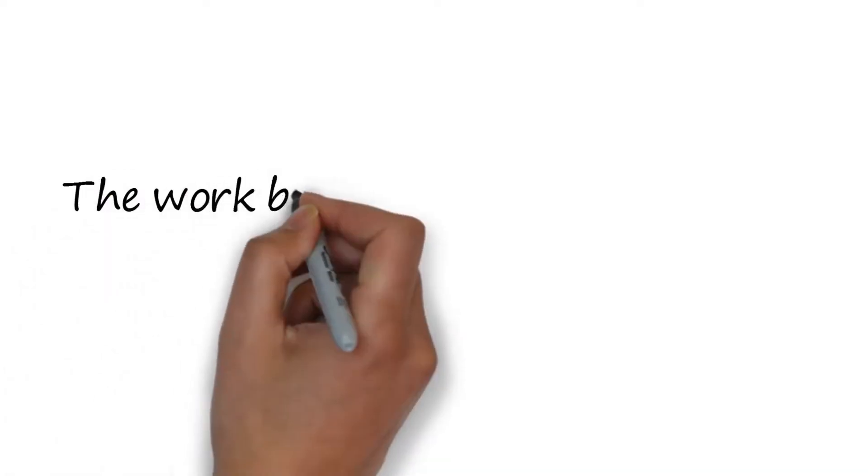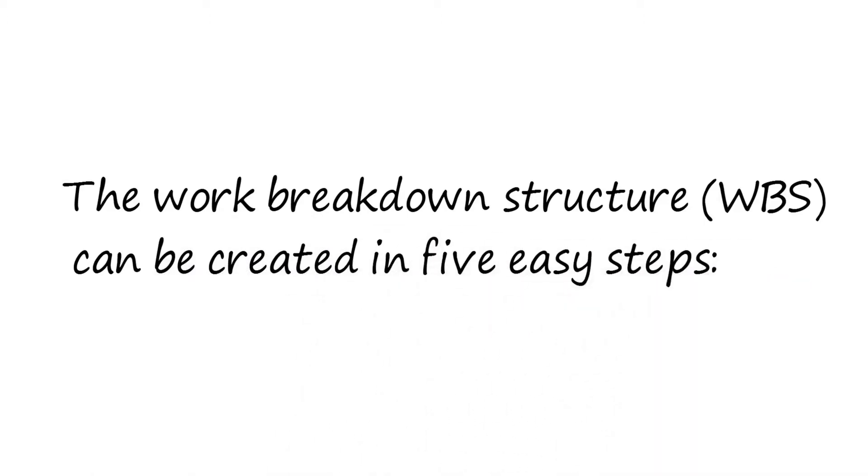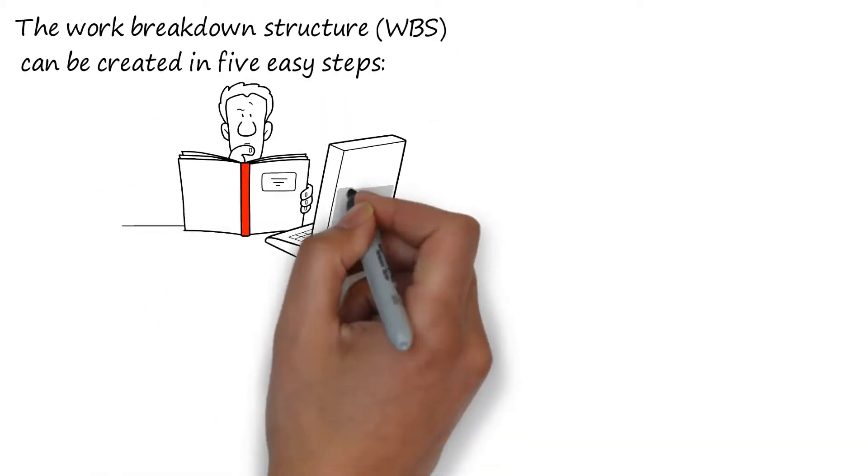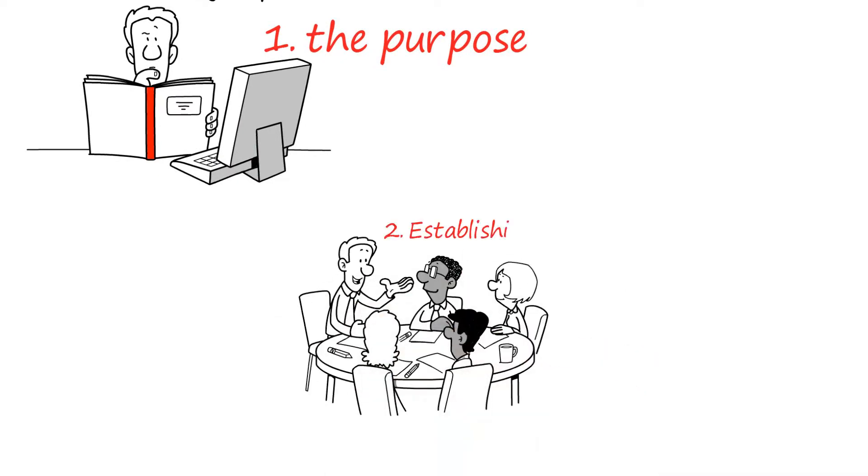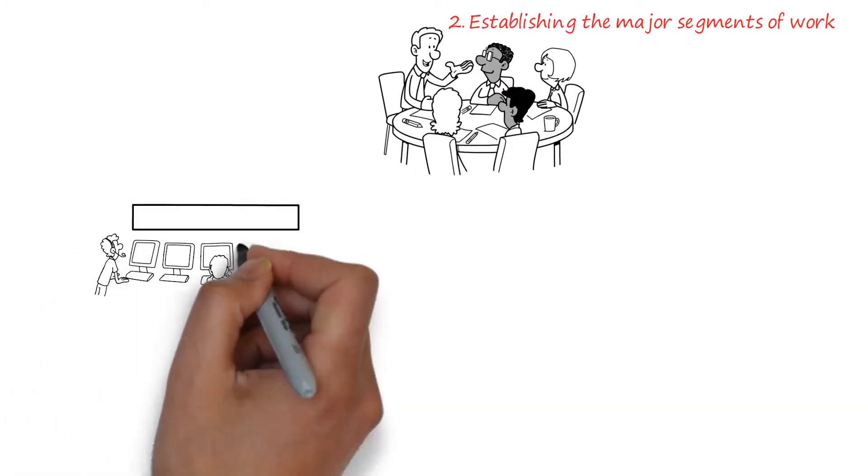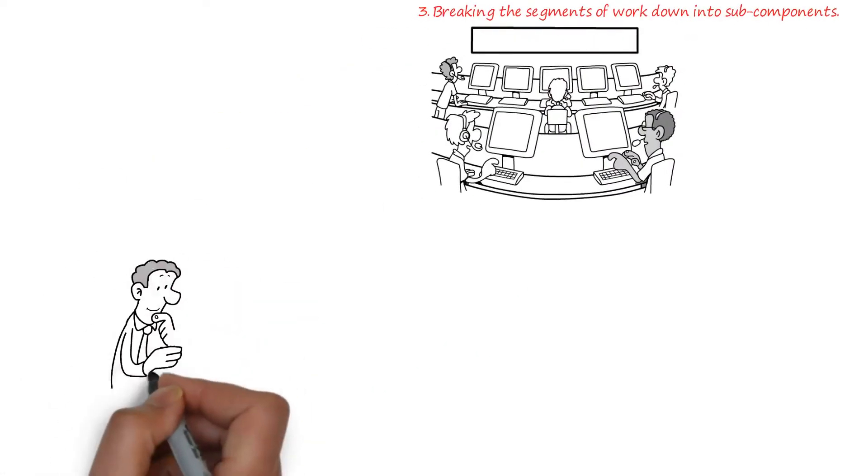The Work Breakdown Structure (WBS) can be created in five easy steps. One: identify the purpose of the project. Two: establish the major segments of work. Three: break the segments of work down into subcomponents.